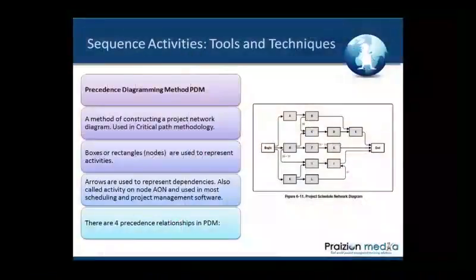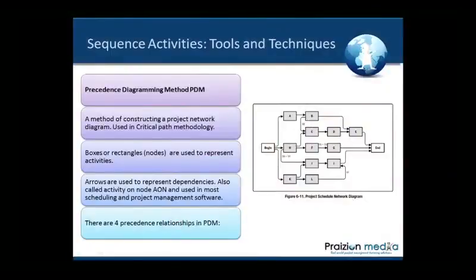How about the WBS being transformed into activities, and those activities ultimately becoming what you see on the screen? Because what you see on the screen is really the progressive transfer of your WBS information into your activity list, from an activity list into a network diagram. When we sequence activities, we come out with a project schedule network diagram, and that's what you're seeing.